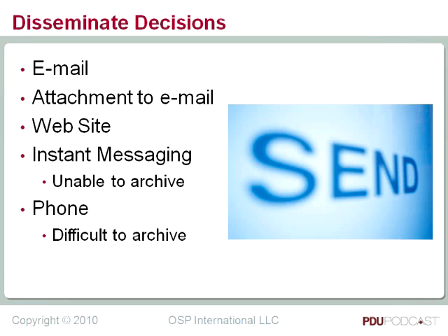Right, but it's very difficult because here we're talking about disseminating the decisions that were made, and if you just archive, of course, the recording of the teleconference, then you have everything, and you have to sift through all the talking throughout the conference before you will get to those decisions. So somebody really has to keep track of decisions, make a note of them, and then disseminate them and send them. And send them and get them out.